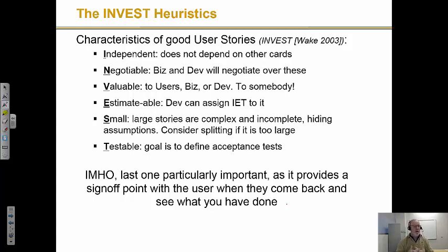And then finally, testable. Part of the thing about writing an acceptance test, and writing the acceptance test at the time that the story is written, not saying, oh, we'll go write the test later and figure out how to test it later, is that it is an immediate translation of the conversation into a form that says there's some way I know that I can validate this. Again, I talked about that notion of validation. And if I punt that down the road, then whatever I come up with for an acceptance test may be wrong, right? Or I may just never get to it, frankly.